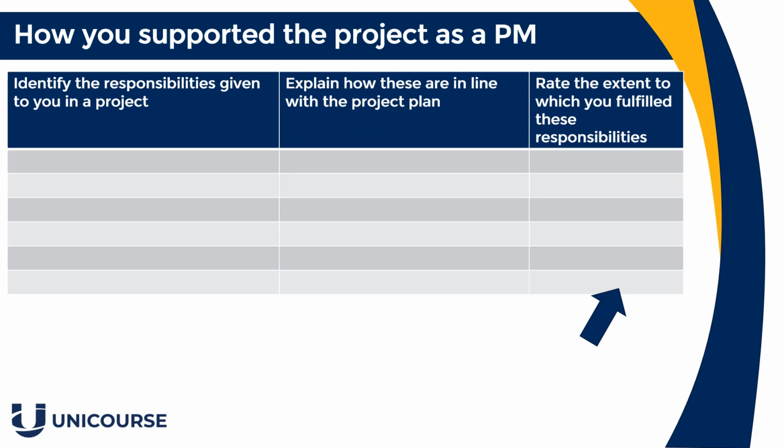Okay, so in the past I've seen organisations use questionnaires to get feedback on the projects, and it's really good because you want feedback. But this form is a simple form that can be completed by the project manager or the project team or individuals that are responsible for each task or objective. So always considering how the project manager is supported, or how you can support the delivery of the project in accordance with the plan. As you can see, each responsibility can be rated 1 to 5.